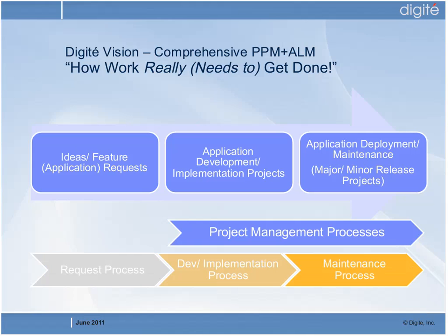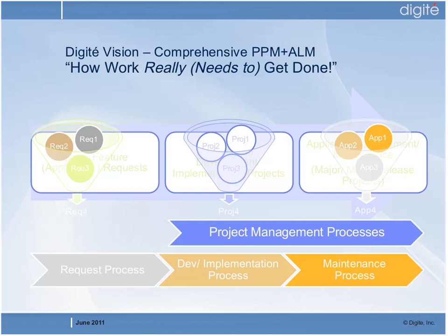And this is really the scenario that we see with most of our customers who see the end-to-end vision of application lifecycle management, that you need to focus on the entire cycle, not just the project itself. And the reality is that you need to have portfolio analysis being done at each of those stages. So you need to do portfolio analysis of new requests that are coming in to see which requests need to make it through. You need to be doing portfolio analysis of projects that are there, so you can see which projects are doing well, which projects are not. And you need portfolio analysis at the application level to see which applications are continuing to meet their corporate objectives, which applications are costing too much and might need to retire, etc.